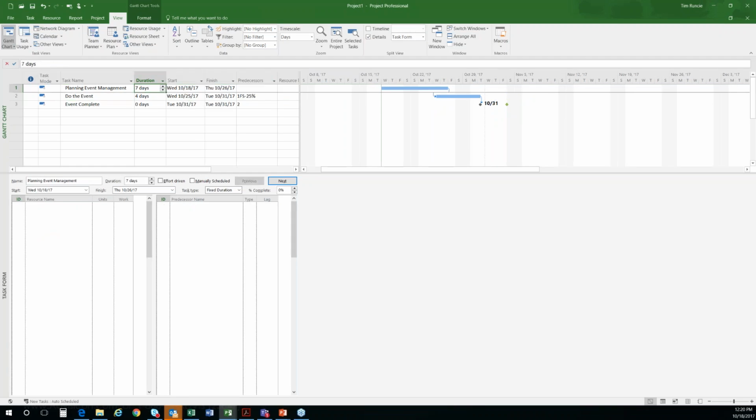And if for some reason you're going to blow past that, let's say somebody says, well, I think that's really going to be not 7 days, it's going to be 12 days. And you go, no, not a problem. But if they had said 13 days, you go past it, your schedule isn't locked in place, you don't get a cryptic message, and you start getting visual alerts that say, hey, listen, this goes past its deadline. We can move and watch that. So a lot of executives love to see the fact that they can put deadlines or targets or even have a little bit of a dashboard.